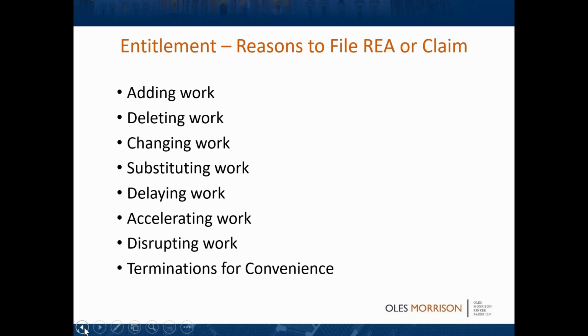Make sure your daily reports are specific to the issue that you've encountered and its impacts. Judge Clark at the Armed Services Board on any type of REA dealing with, for instance, construction, the first thing that he wants to do is to read the daily reports from the beginning to the end, because that should be the mechanism by which you're preserving the record as to what the government actually did to you.